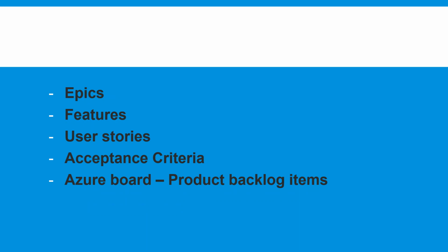So starting from the top, you've got the epics, and like what we just understand, what you just explained. I understand the features as well. Yeah, just hold on. I need to walk you through start to finish. So the epics is a band of features, right? And then the features hover over the user stories. So a collection of user stories will form your features. A collection of features form your epics together. So it's the user stories that I was referring to.